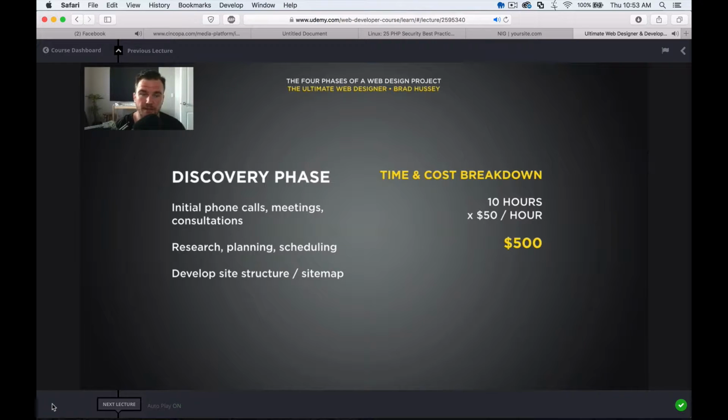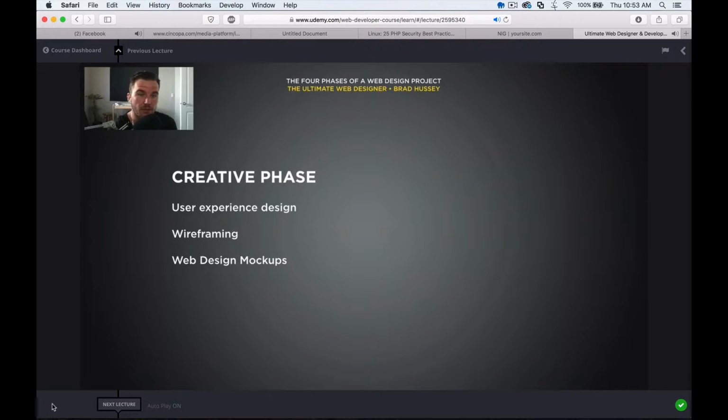In some cases, I actually just quoted a project, and the discovery phase was much longer because it's a brand new project. And the client, I could tell from the beginning, they really wanted to be involved in the planning. So I allocated 20 hours to this specific section. So about 10 hours, 20 hours is a good time cost breakdown. Then we move into the creative phase.